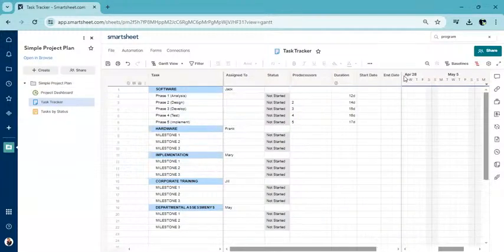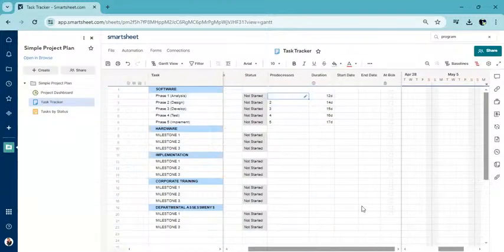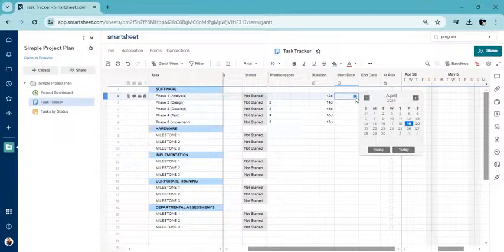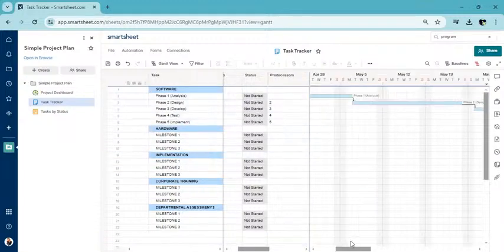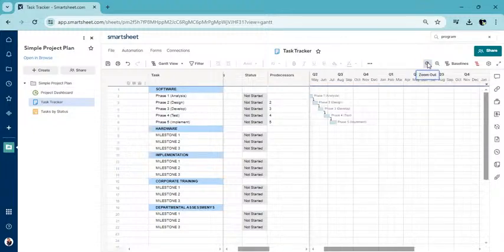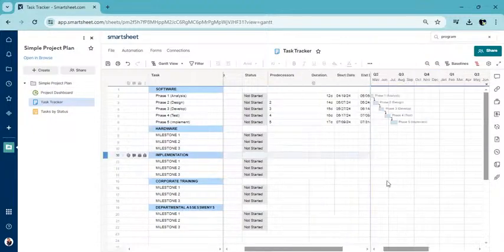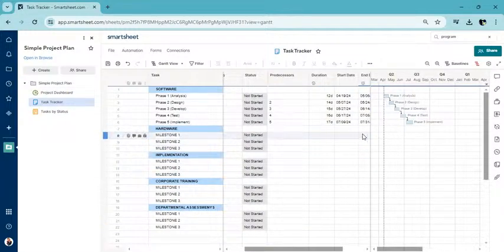When we put in the durations, we've not got the dates in, so we need to at least get the ball rolling with a start date. So let's put in today's date. And now we've got some linkages, as you can see. That's exactly what we're trying to do. So we're trying to make sure everything is linked nicely. And because we are assuming they are linked in that cascading fashion, we can just very well go ahead and say phase 1, phase 2, whatever that might be called, phase 3.